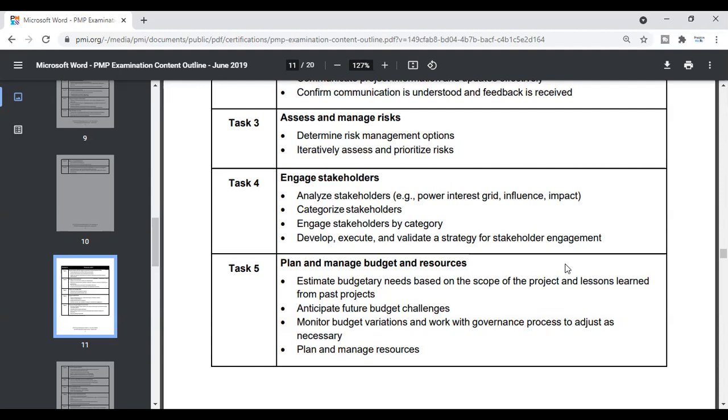Understand that when we look at product backlog items, for example, we should also look at them through a risk lens. Those that are risky, but high value, you want to do those first. Those that are not as risky and are high value, you want to think of doing those next. Those that are high risk and low value, you don't want to do those, do you? Because those might end up being less bang for the buck. So you want to do those that are low risk, low value before thinking about those that are high risk, low value, if that makes sense to you.